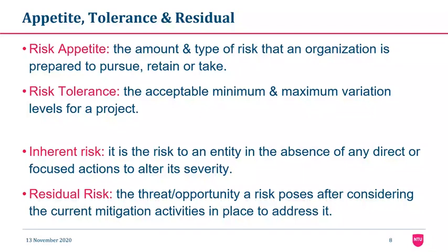And risk appetite depends on the company's longer-term strategy of what it needs to achieve. Risk appetite is a higher level statement that broadly considers the level of risk that management deems acceptable, while risk tolerance is narrower and sets the acceptable level of variation around objectives.